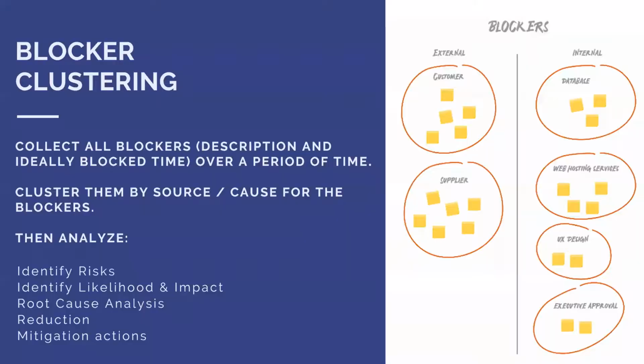And now about the blocker clustering. So when you already see that you have these blockers in your system and you want to avoid as many of them as possible, you should collect them. So if you see that you have removed a blocker, this issue is closed. Don't throw it away. Collect information about the blockers and then conduct the blocker clustering. So collect all of these blockers over a period of time. Say you do it once per month, collect them over a month.